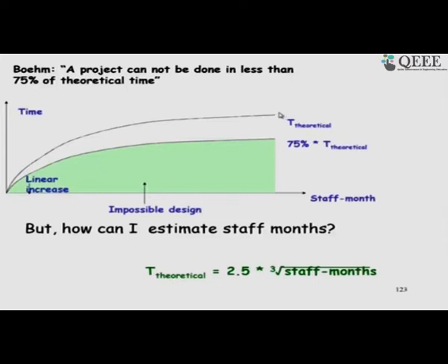If you want to do it in less time, you need a very high staff requirement, and if you want to reduce the time duration by more than 25%, then it will lead to project failure. So, that was his analysis, that if you have estimated it to last 1 year, then you can at most do it in 8 months.